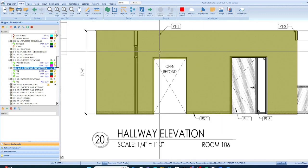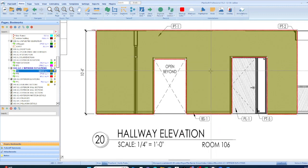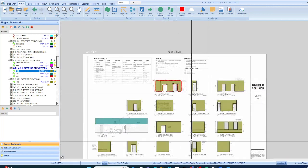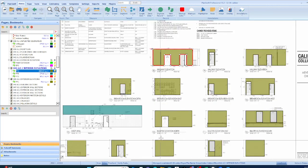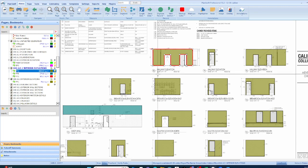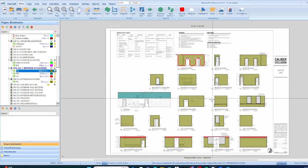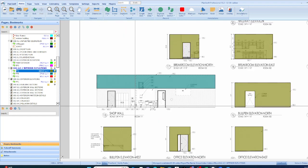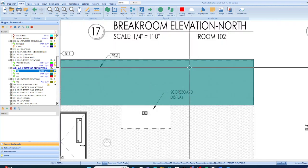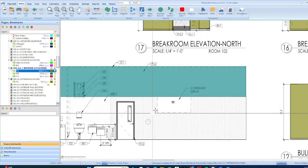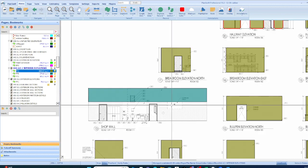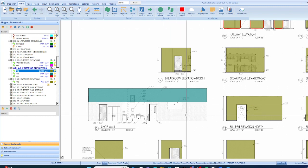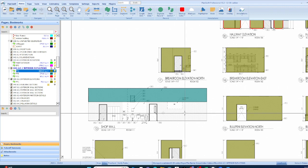And from the interior elevations, you can just produce your numbers. And a good set of plans is going to give you an interior elevation for each of the rooms. So that way, you'll know the finish, PT6, you know what parts not painted. And so for painting, you'll assume that the walls are being painted, the ceilings being painted, doors are being painted, and door frames have to check very carefully. I excluded window framing, if that's being painted. But you can look at the specifications. And sometimes HVAC is being painted, pipe is being painted.